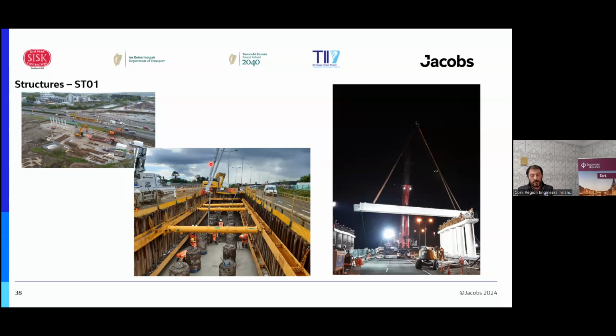The problem we had with the main embankments was there was a lot of large rock fill in it, which meant we had to go out at night time and probe up to 7 and 8 meters with large excavators. We removed boulders up to 3-4 ton, and did a lot of damage at night time.